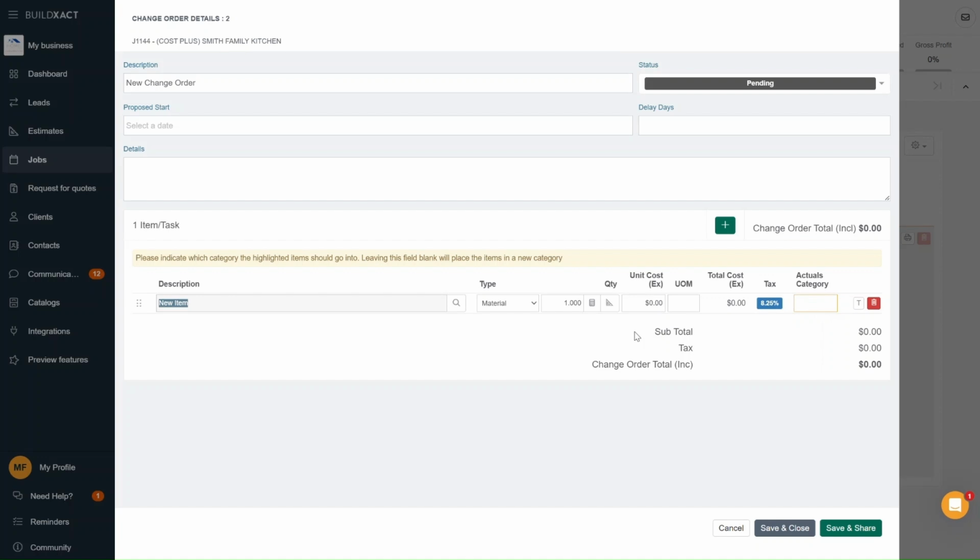Because of that, we've absolutely had people put in notes to the effect of, note, this is before markup is added, or something similar, whatever helps you communicate that point. The reason for highlighting this is to avoid the scenario where the client goes, oh no, I thought this was the full amount. When they see their invoice, it'll be clear that the full amount is plus markup, and hence having a note here can be really helpful.